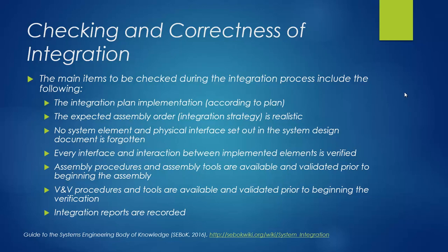We need to make sure that the assembly procedure and assembly tools are available and validated prior to beginning the assembly. And we need to make sure that the verification and validation procedures and tools are available and validated prior to beginning the verification. In addition, we need to create reports and record everything that has been done during the integration.